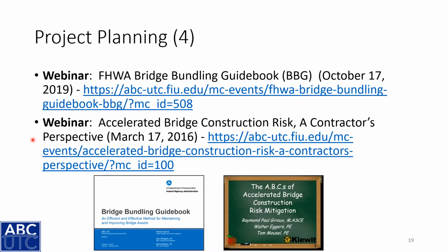This webinar highlighted here is about ABC and risk, and a contractor's perspective on the risk associated with ABC projects. There are often incentive and disincentive clauses built into some of the ABC contracts to try to incentivize contractors to complete a project in 24 hours, and then they'll add charges, a charge per hour, if the project goes over that.